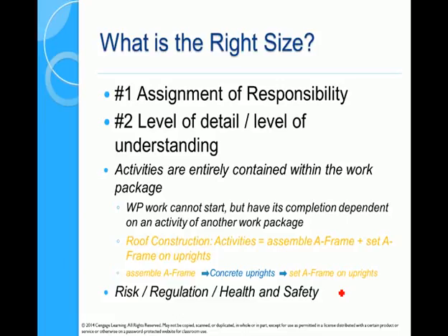So work packages can be dependent on something. Right. So here we have set A-frames on uprights. That's dependent on this work package, which subsequently was dependent on this work package. But these two things here cannot be a work package because they get interrupted by somebody else's responsibility. So you need it to be wholly contained.